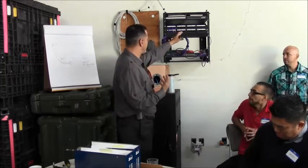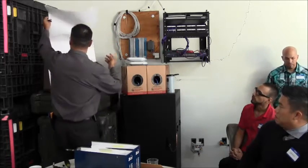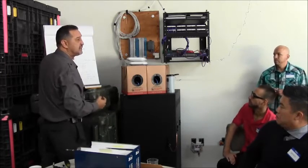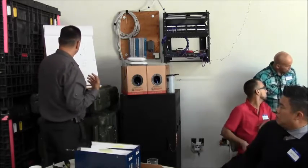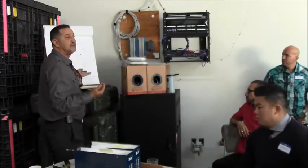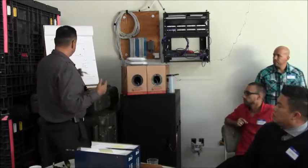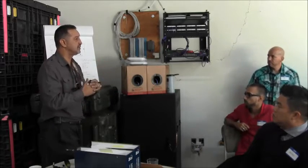So now that we're getting ready to run the cable, how do you pull cable? Well, we're going to have a print, and the print is going to tell us, from building 1 and all that, we're going to have the station cables. Of course, there's going to be hundreds of these little triangles. The triangles each mean something in our trade. An example would be a triangle with no color equals 2 data cables. A solid one will mean 1 cable, a voice only, and the ones that are split in half say 1 voice, 2 data, so that one gets 3 cables.